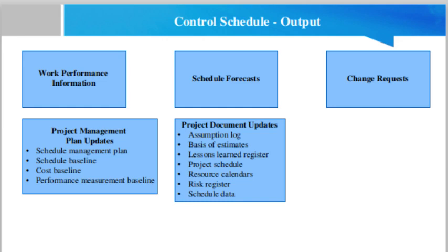Changes to the schedule baselines are incorporated in response to approved change requests related to change in project scope, resources, or activity duration estimates. The schedule baseline may be updated to reflect changes caused by schedule compression techniques or performance issues. Cost baseline.